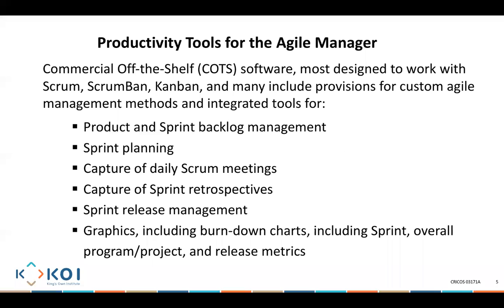Again, the Jira system allows you to do that. Let's say we are working on user stories 1, 7, 8, and 9. A person allocated to user story 1 will go to that user story, understand what needs to be done, and start putting in all of the tasks that are required to make the sprint. Then we'll start putting in all of the timelines, when we expect it to be completed. They then start putting priority on all of these items to be created. All of this planning is done within Jira itself.